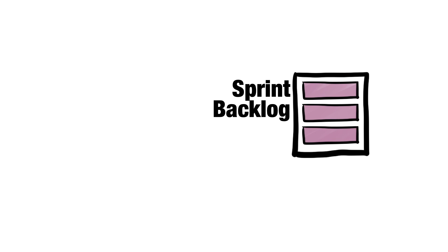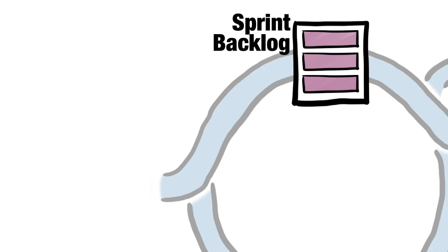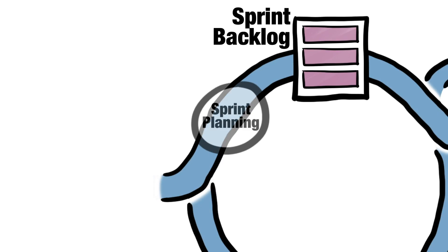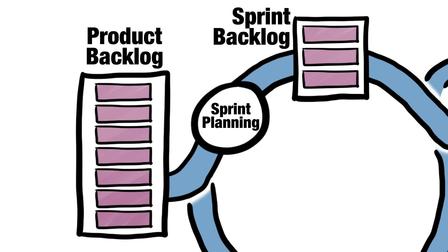The Sprint Backlog is a list of things that the development team will work on during the Sprint. It's created once per Sprint, and the event where it's created is the Sprint Planning Meeting. The Product Backlog — the master list of things to do — provides the input.